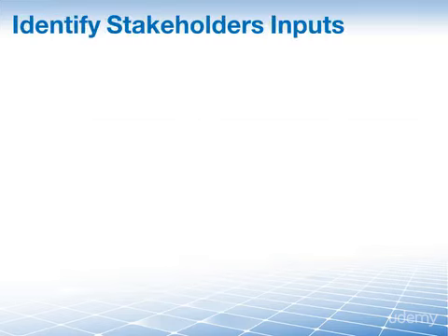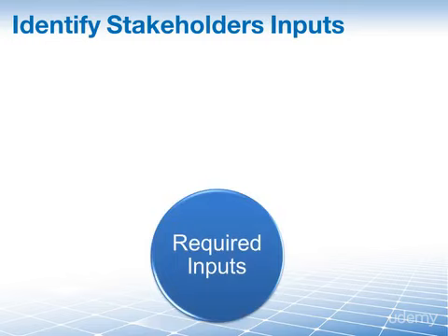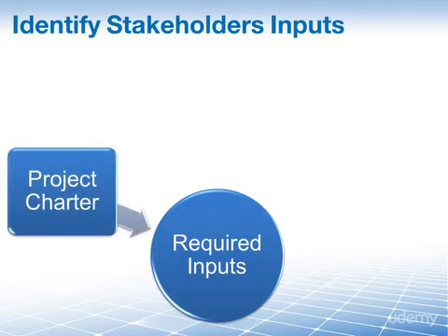Identify Stakeholders is part of the initiating process group. This means, as we execute this process, our project is in its infancy. It has barely begun. Thus, we have a limited set of inputs. Here they are. The project charter, which may document internal or external stakeholders. For instance, you'll find the sponsor's name or the customer's name in this document, to name just 2.